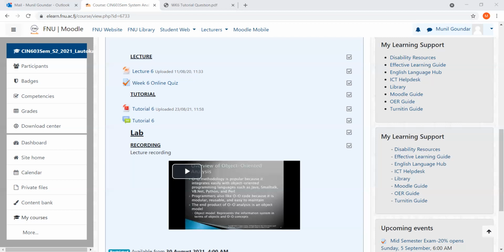Now, build website. The activity is dependent on activity 5 and activity 6, both of them together. So 20th Jan is the greater value out of these two figures. So the next date is going to be 21st of Jan 22, takes 20 days. Now you will not do 20 plus 20, 21 plus 20 here.